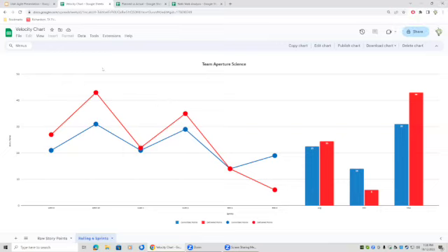I like to say that the only reason to track velocity is to help teams more accurately calculate future capacity. Like when I have leaders that want to see these stats, I never want to let them track these stats because they tend to try to compare teams against each other. And